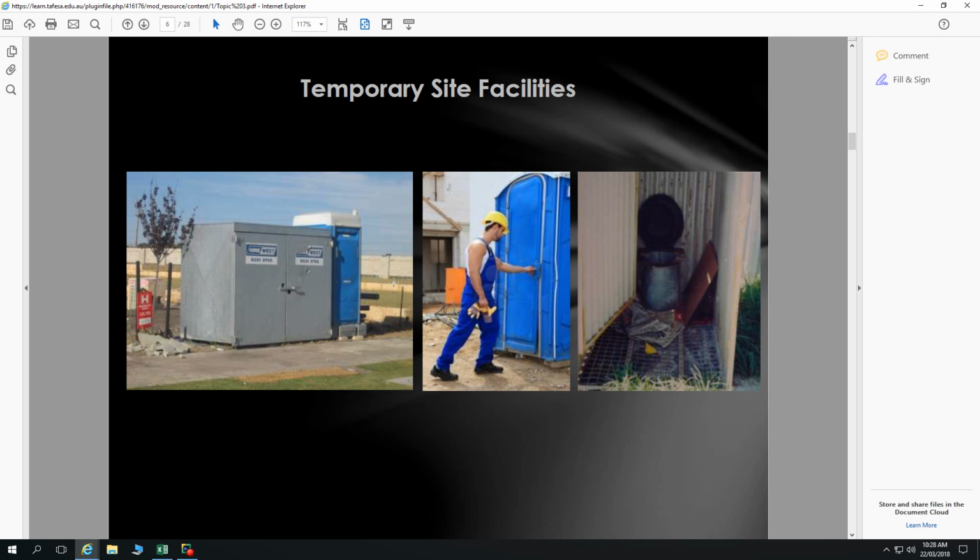It is an issue with building sites now, particularly, that a lot of stuff gets stolen from building sites, and so it's fairly much standard now that site fencing goes up around to protect those things. It also helps cover the builders in terms of liability. If there's anybody who's unauthorised to be on site, it stops them going onto site and being at risk of having an accident, etc.